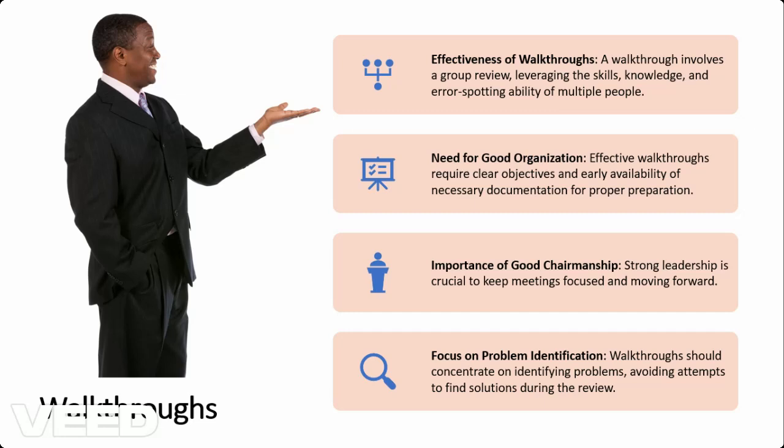And usually walkthroughs are done within the team itself. So when a particular programmer says I'm through with this particular product or deliverable, or an analyst has drafted the requirements, or the designer has designed the interfaces, then they'll say I'm ready, and then they walk people through and they get input from fellow experts.